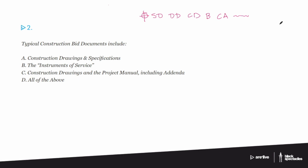CDs, the CD moment, that particular moment is now you're changing focus. Now you've had your conversation with the owner and they've signed off at the end of DD, and so now you're having your conversation with whoever the eventual general contractor is, you're having a conversation with bidders, you're having a conversation with code officials and permitting officials, and so there's a whole different focus on that. And I want to just sort of focus on the term CDs. So a lot of people will say construction drawings, that's what that phase is. There's a couple of other CD terms. The actual term there is contract documents, and the reason that's important is it kind of puts, it sort of highlights what's actually going on. When you're doing your work by the end of DD, what you're really preparing once you've gone from DD into that CD phase, that contract document phase, is you are creating the contract between two other people.